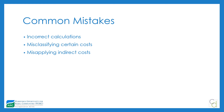Another common mistake is not considering historical projections or trends in costs — under-budgeting or over-budgeting for things like travel. We sometimes see grantees wish they had budgeted more for support staff, thinking a single program manager could do it all. These are large and complex projects. Consider the entire lifecycle of getting a participant interested, screened, trained, coached, supported, placed, and followed up with — that takes a lot of human capital and many touch points. Consider capacity for financial and programmatic tracking and reporting. At the same time, sending money back is embarrassing, so find that sweet spot and ask for what you truly need.